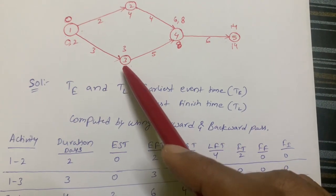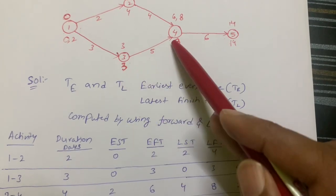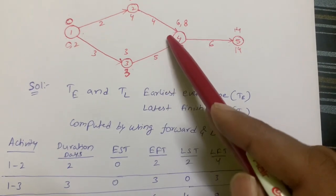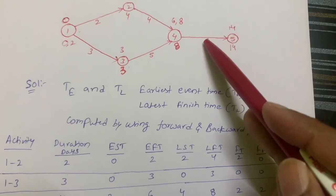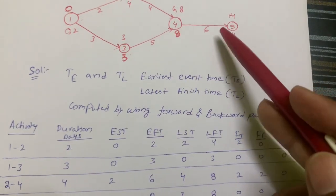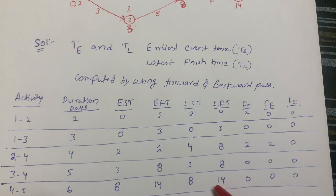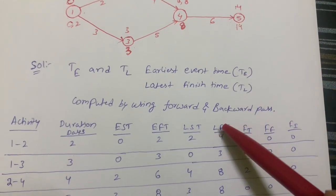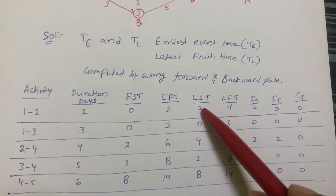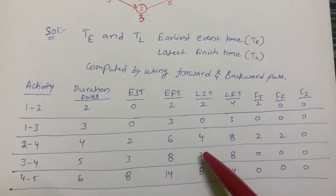For activity 1-to-3, LFT = 8 − 5 = 3. For activity 2-to-4, LFT = 14 − 6 = 8. For activity 3-to-4, LFT is also 14 − 6 = 8. For activity 4-to-5, LFT = 14. After calculating LFT, we derive LST = LFT − duration: 4 − 2 = 2, 3 − 3 = 0, 8 − 4 = 4, 8 − 5 = 3, and 14 − 6 = 8.